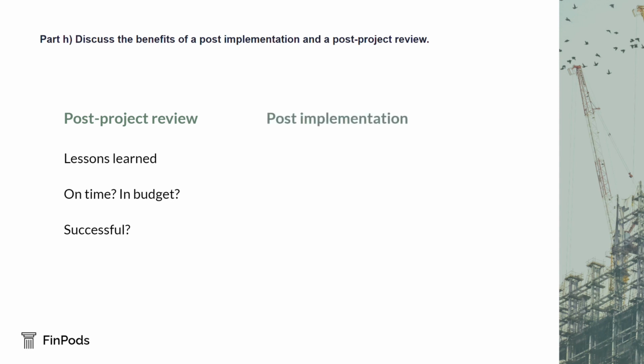Post-implementation reviews are assessments of the completed working solution. The post-implementation review focuses more specifically on the output that was produced by the project. It is carried out for 3 main reasons. To determine how well the project met its objectives, delivered the expected benefits, and addressed the requirements that were originally defined. To consider the working solution to see if further improvements could be made to optimize the benefit delivered. To identify lessons that can be learned and fed back into the output production process.